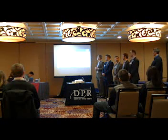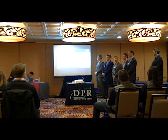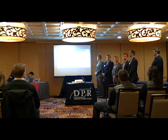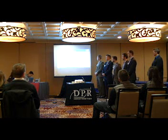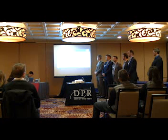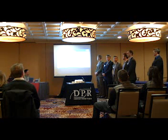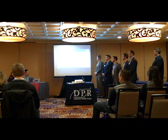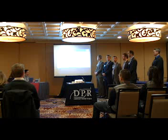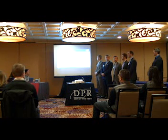And additionally, the owner indemnifies DPR for existing hazards, meaning that we are not held liable if what they find is incorrect. There's also a deductive fee associated with change order deletions, but it's only after 10% of the scope has been deleted. This eliminates a lot of the risk, unlike contract B, which just has a deductive fee if any of the scope is deleted. There's also a waiver of subrogation in the contract language under the property insurance clauses. So this is important because it protects DPR in the event something could go wrong.